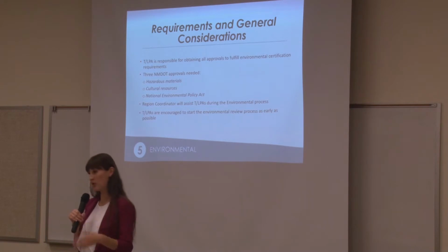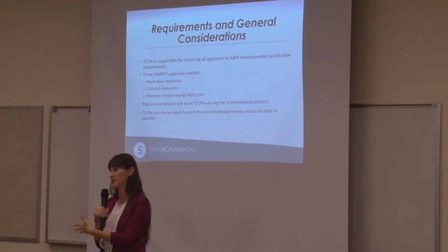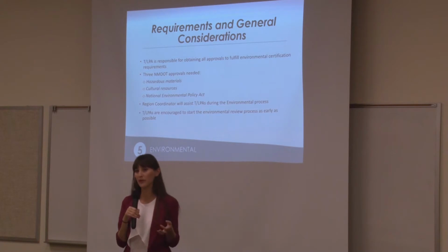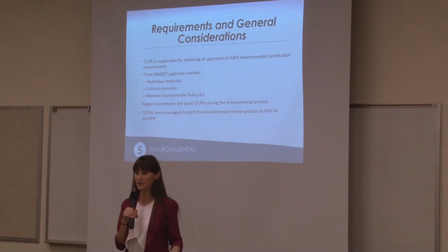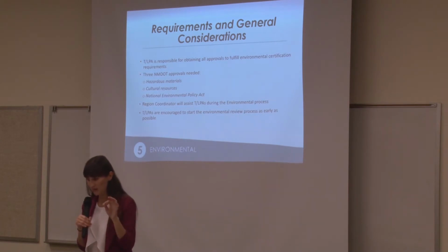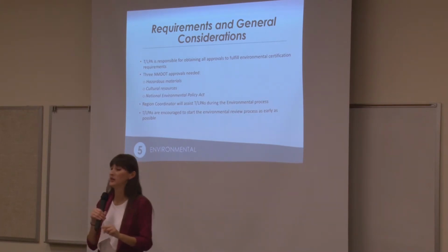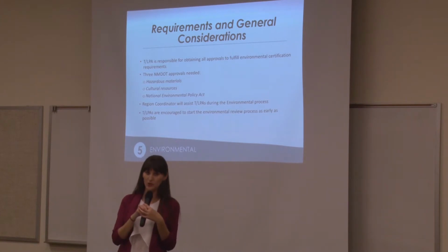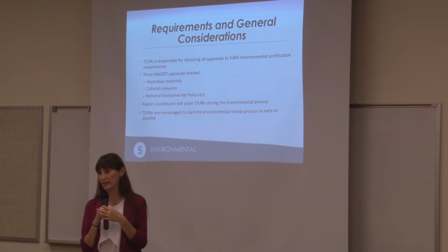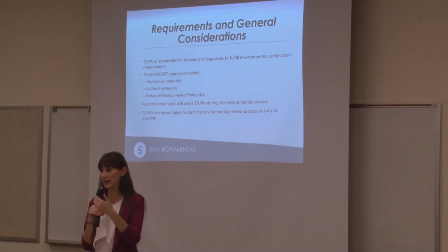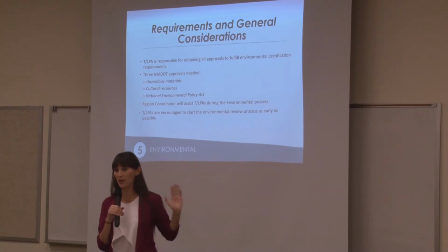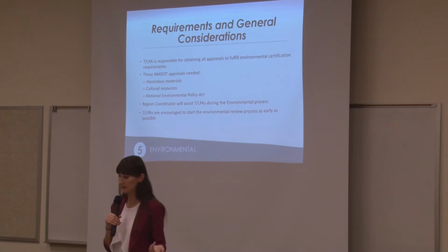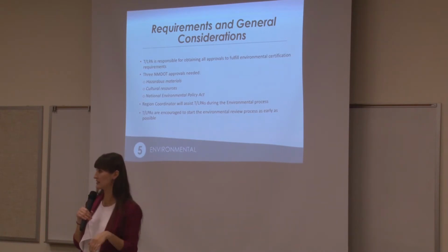The region coordinator is your point of contact. They will assist you through the environmental process. They will work with our environmental bureau at NMDOT to submit all of your documentation that's required, and then to issue you a certification. Okay, so just keep in mind that your point of contact is still the region coordinator. You can hire consultants to help you with the environmental process. Okay, so if you have staff in-house that can handle those things, that's okay. But if you have a consultant on board, everything under environmental is a reimbursable expense, as long as you had it in your scope of services, in your RFP.